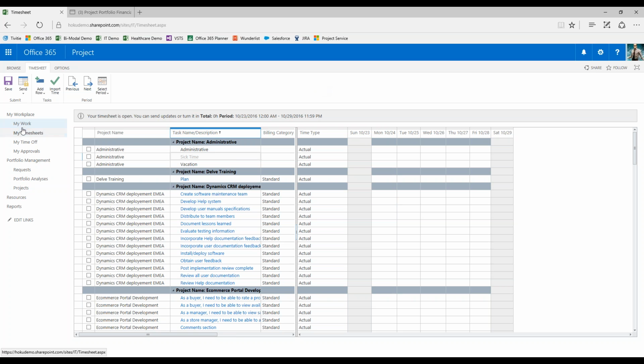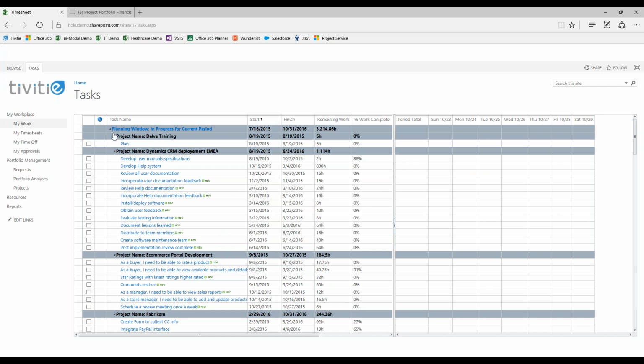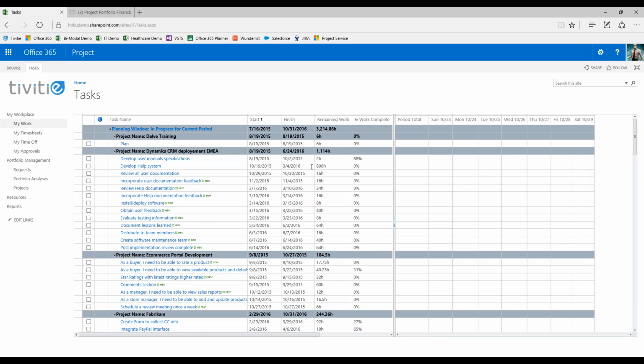You can even do things in here like do a combination of reporting time. You can report time along with progress. So for example, if you want to track time or actual effort spent, but also track percent completes and other date-driven types of things in here, you can actually update the tasks that have been assigned to you in here